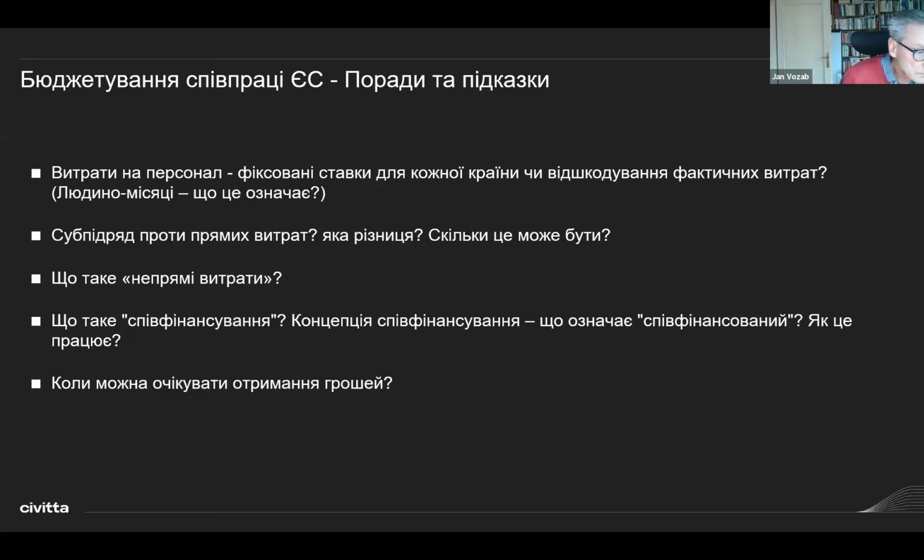Here, interestingly, even projects with 70% co-financing might be achievable to implement because, again, the indirect cost might come on top. So indirect costs, in some cases, might get you back to 95% of total costs being reimbursed. So you need to think strategically. Does that make sense? Is the project important enough for us to apply, to hassle and deal with the co-financing? Can I afford the co-financing?